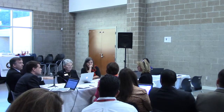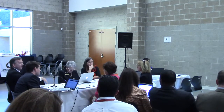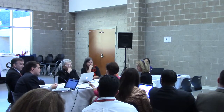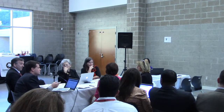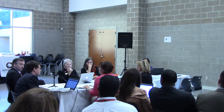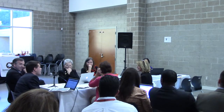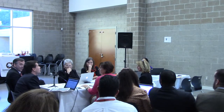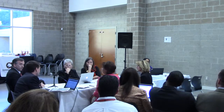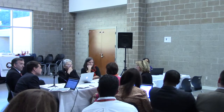But I want to be very comparable to who is signing. It is very comparable to this document that you're seeing right here. It just might change the name of who it's going to and who's signing it. Someone in the public isn't just signing this. This is our document. The two of you would execute it as the executive committee, and there would be provisions there. It will be AIA 101, which is our standard contract that we do with architecture firms, with defined language in there to stop until you get a notice to proceed. I think that's good. That's fair.